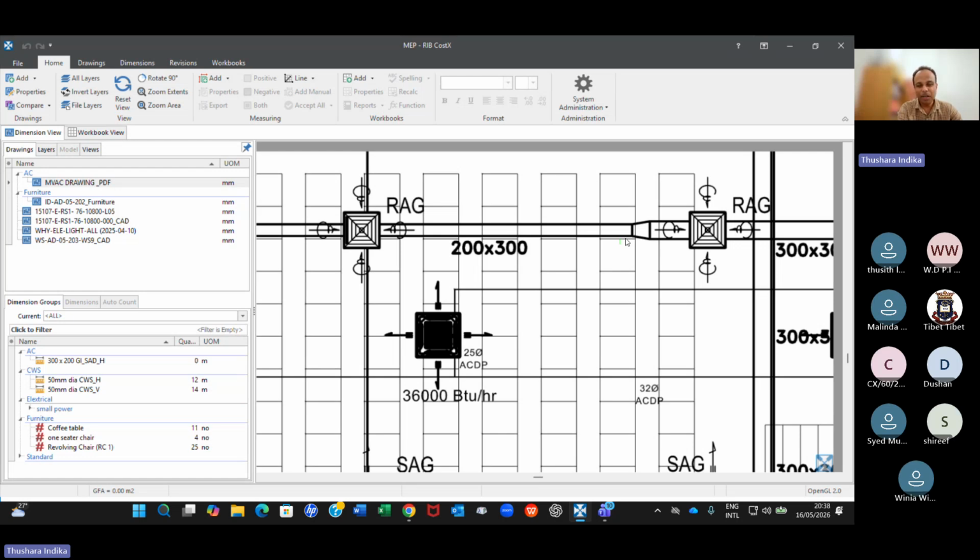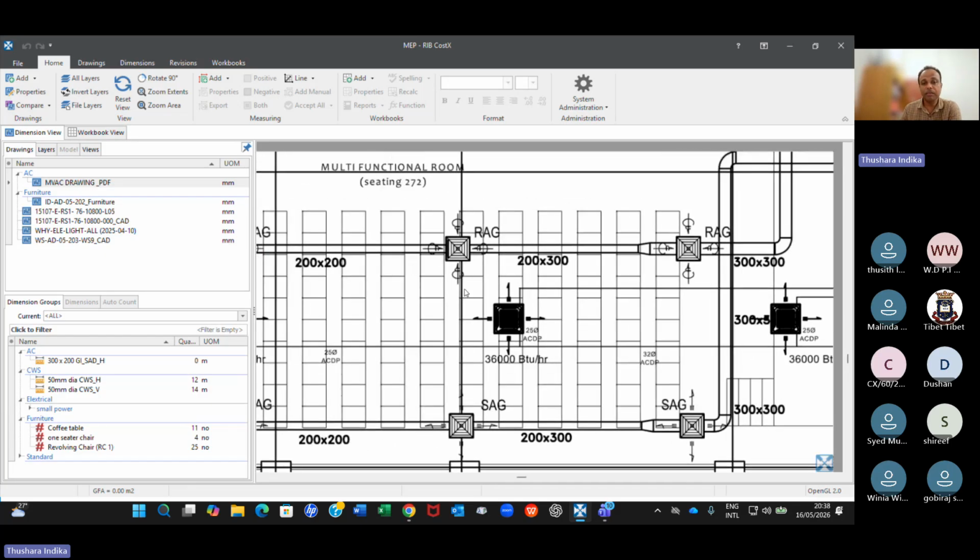It doesn't matter much because as long as you know the kilograms per square meter, you can always convert square meters into kilograms. And then of course you need to know the gauge of the duct, the thickness of the duct material. So that's what we learned, and that's what we need to learn now.